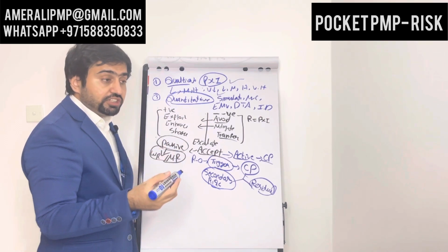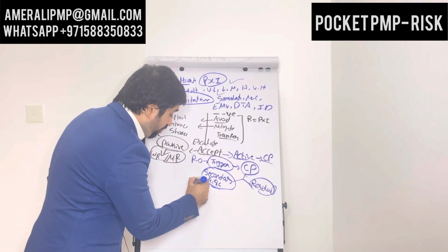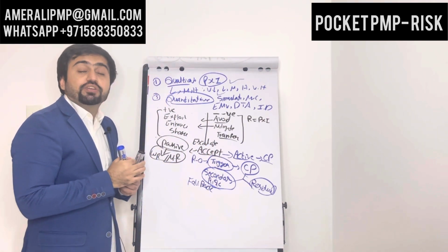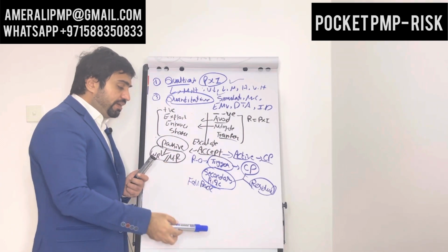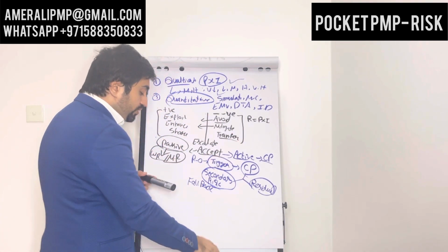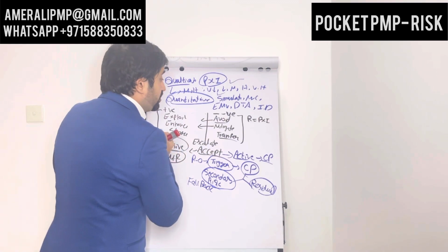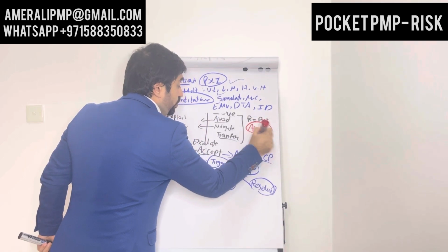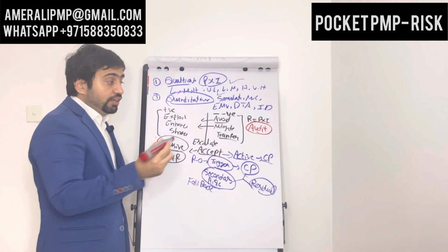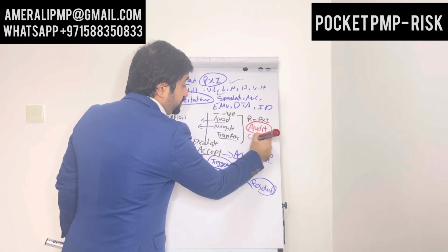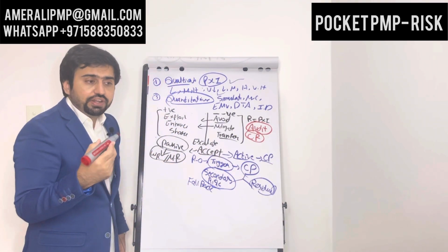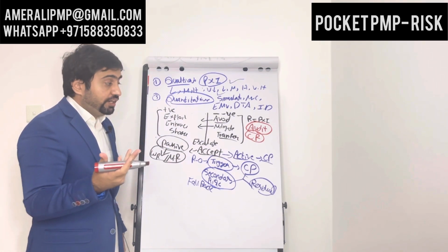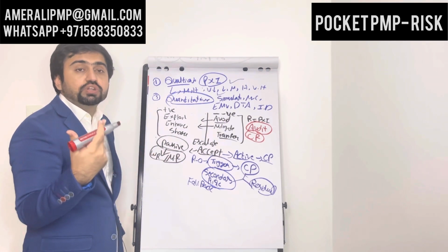Sometimes, in addition to a contingency plan, we have a fallback plan. If the contingency plan fails, we are going to do the fallback plan. You can say it is plan B. You implement the risk response and monitor it throughout the process. In addition to that, you do a risk audit, that is checking the effectiveness of the process, how good you are at managing the risk process. You keep checking your contingency reserves, how many reserves are left, and if any reserve is not used, meaning that risk did not materialize, you release those reserves back to the organization, to the reserve pool.